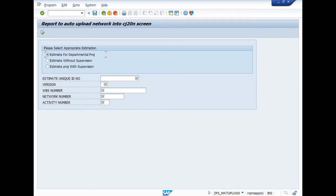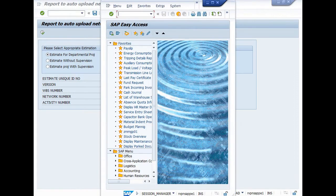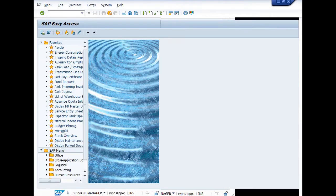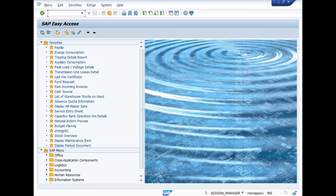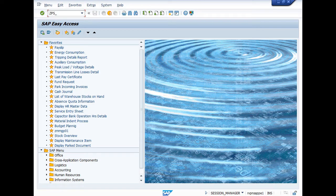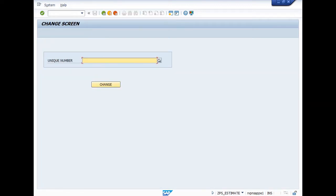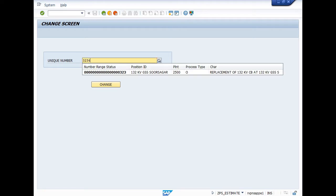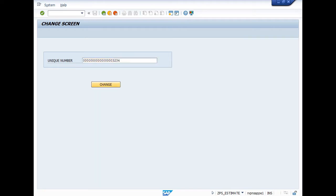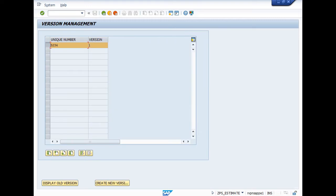Now there are five fields you have to fill. First one is estimate unique ID number. This is the unique ID number generated when you prepare estimate. When I prepare the estimate under the T-code ZPS_ESTIMATE, my unique number generated is 3234. So you have to enter the unique ID number 3234 here.